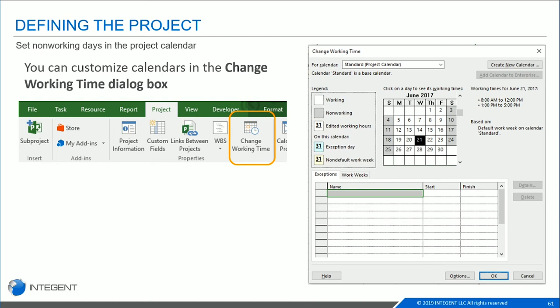There may be holidays that you want to incorporate so that when you're scheduling your tasks and you want to get an accurate view, it'll skip over, with our next holiday coming up at Thanksgiving, it'll skip over Thanksgiving. It'll skip over some of the other holidays that you want to build into your plan. That way you have that accurate scheduling of when things are going to take place. If there are recurring holidays or time off, such as you get every second Friday off, then you can set that in here as well.